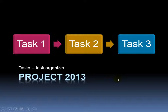A very basic and simple sample would be writing a book. My first task would be to research the book, then next write the book, and then finally print the book. These tasks are linked up in a relationship, meaning I cannot start task 2 unless its predecessor, task 1, has been completed. This makes sense because if I haven't researched anything in task 1, then I have nothing to write about in task 2 and nothing to print in task 3.